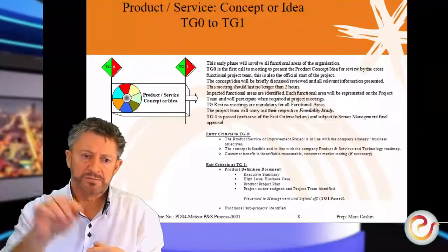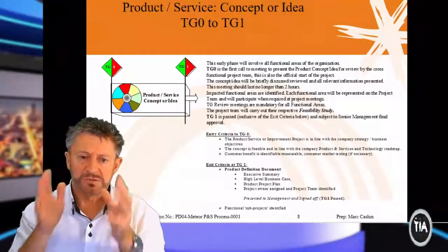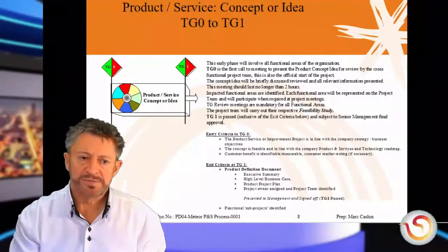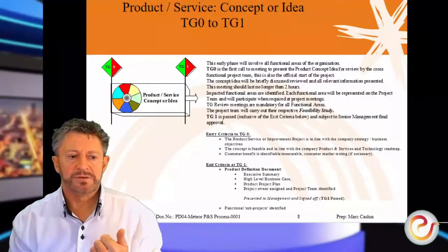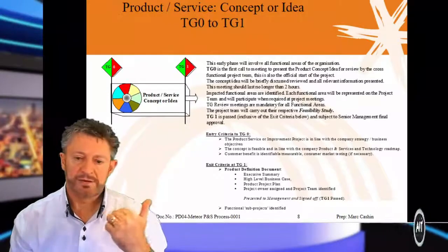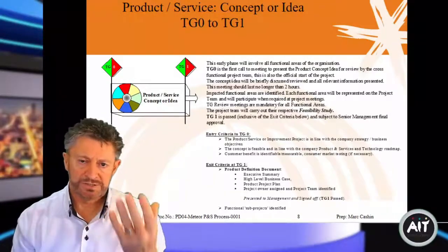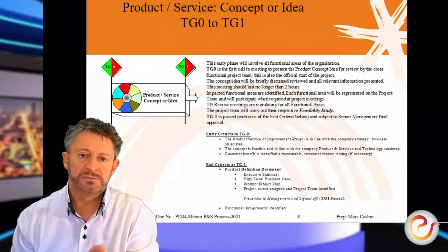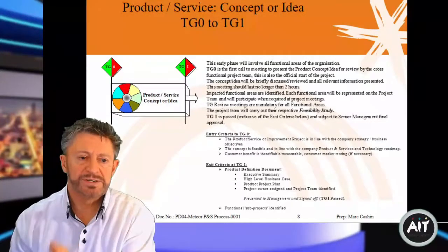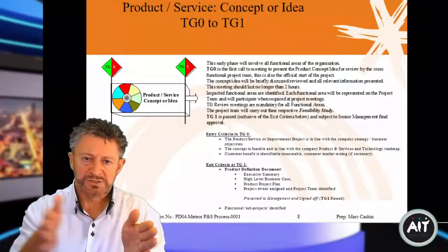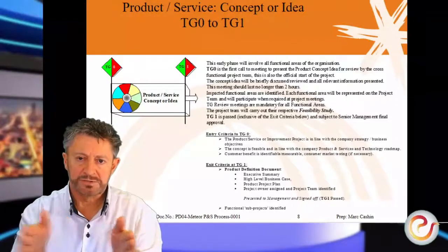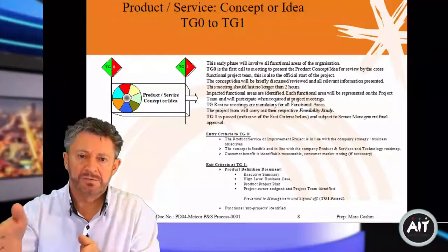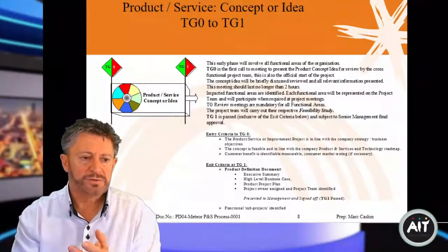So when we break even, when we start to make profit, and we took those bits of information out into this high-level business case. And then we'd have an outline plan, roughly how many, if it's 11 weeks for this project, if we start in week 10, then we should technically be finished by week 21. So we have it broken down how much time it take and spend, how long it will take to implement it, how long it will take to test it, and then when we can go commercial on week 21.